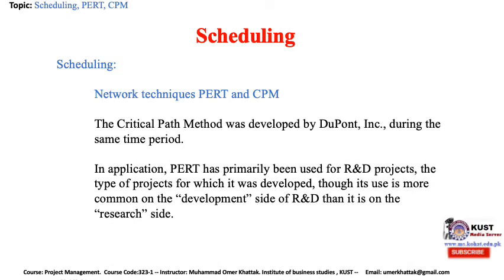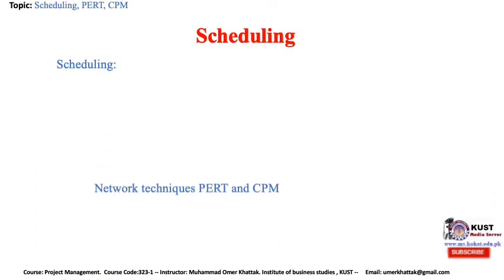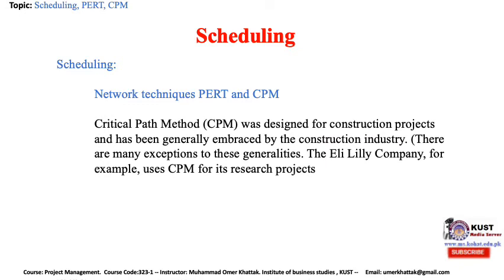In application, PERT has primarily been used for research and development projects — the type of projects for which it was developed — though its use is more common on the development side of R&D than on the research side. The Critical Path Method was designed for construction projects and has been largely embraced by the construction industry. There are many exceptions to these generalities; for example, some companies use CPM for their research projects. The use of PERT has decreased sharply in recent years because a large majority of project management software generates CPM networks.